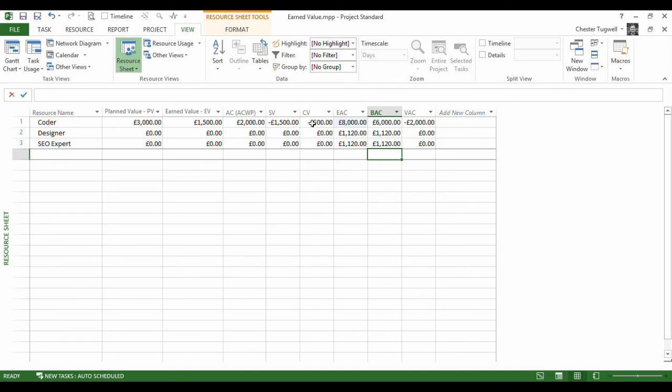But this negative figure tells me a cost variance. The negative figure tells me that there is an overspend. So it's the difference between these two values here. So this negative figure tells me that I've fallen behind schedule, and this negative figure here tells me that there is an overspend up to the status date.